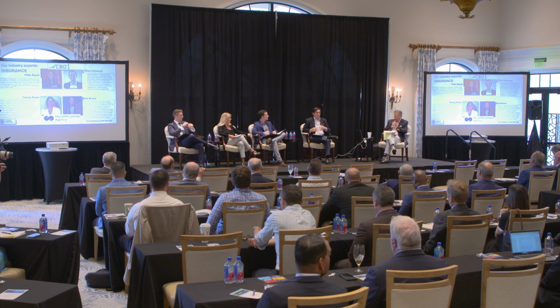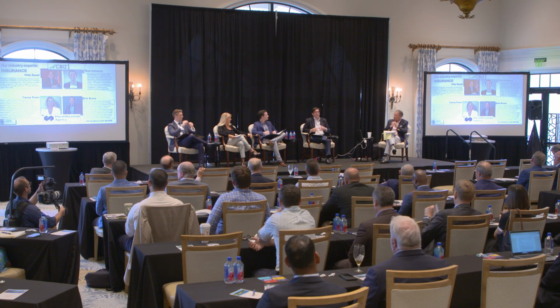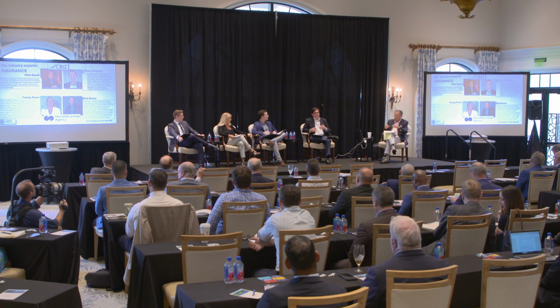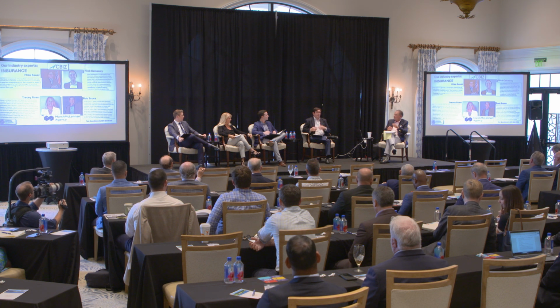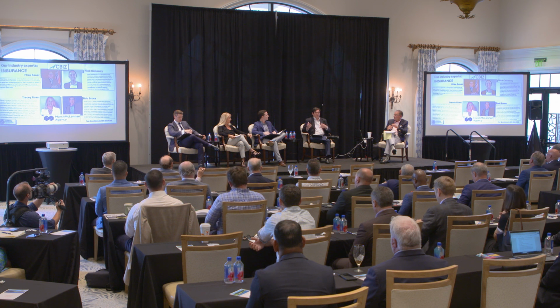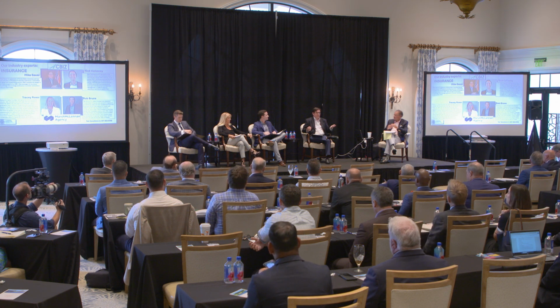5 or 6 years ago, we were able to place these golf course renovation projects with Zurich or US Assure with no problem, but now they've kind of caught on to it. And what we've been able to do is there are a few key markets that can offer the coverage. There are limitations, so they might provide you plenty of coverage if an aircraft comes and crashes down into the course. But if it's a wind-related event or an event where you have a number of trees, you're paying a per tree debris removal type loss.